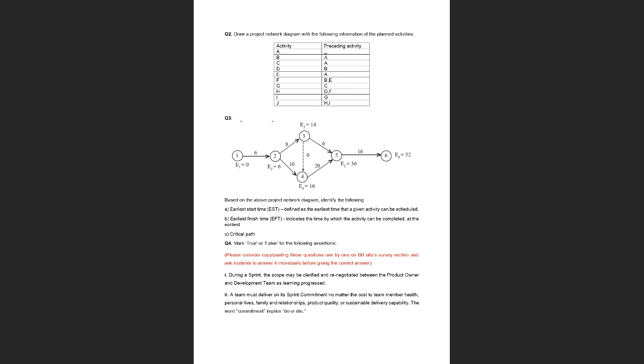Now next, let us have a look at activity 3, 4. What is the earliest time that you can start this? This is important because it will be needed to work out the earliest start time for the next activity. Yes, 14, because 8 plus 6 is 14, and only after the 14th day can this start. Now whenever there are two arrows coming in, we have to look at both of them and take the higher number. So this way we have 14 coming in.